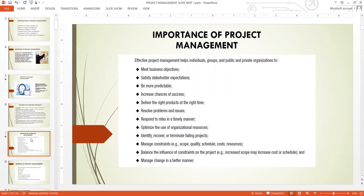Respond to risk in a timely manner: when a risk is coming, capture it in your RAG log, analyze it, look at the mitigation plan, and assign it to the subject domain expert within that risk area so it gets resolved. Without such plans, every time you have a risk you run to your program manager, and the program manager will know you're not a good project manager, because you should be able to manage your own risks.